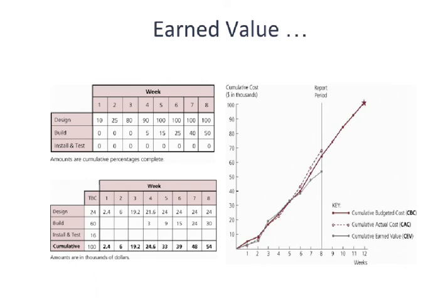When we actually plot this, you now notice that the earned value is below what we've spent on the project, and even below what we've budgeted on the project. So what is really happening is we are spending money at a rate faster than expected, and we're accomplishing work at a rate slower than expected. And so that's a double negative.